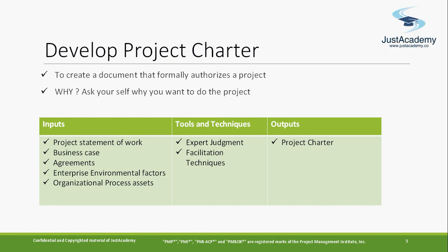Okay, if it has received, he can start a project. Very important, like one or two questions from this overall PMP certification questions. The input that you need is a project statement of work and a business case where you are going to develop it, and you're going to have what are the activities, means how on a high level they are looking to do it, any agreements, some sort of that, and sometimes why an agreement is needed.